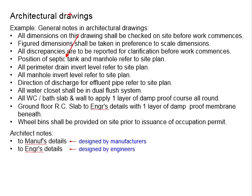Next: positions of the septic tank and main hall refer to the site plan. The architectural drawing provides an overview of the existence of the septic tank and main hall, but their positions are not given precise dimensions with respect to the building. You cannot decide the positions by measuring locations in the drawing, as there are other on-site considerations — for example, ground conditions, levels, obstacles, and the fact that piping between the septic tank and manholes operates on gravity flow.